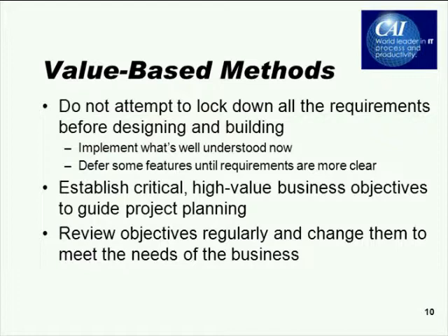In most projects, there's going to be some requirements that are pretty well understood at the beginning and some that are going to require some time and learning to understand better. So what you want to do is do the well understood requirements first and defer the less understood requirements until later in the project. The team will learn along the way and can fully elaborate those deferred requirements at the right time.